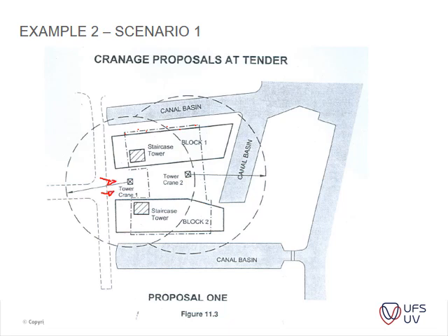You can see the access is limited to this crane here, because it doesn't necessarily reach everywhere. So that's one of the considerations that you need to take into account, is access to site and to where the crane can actually go. Okay, but just go read through it. I think it's fairly straightforward.